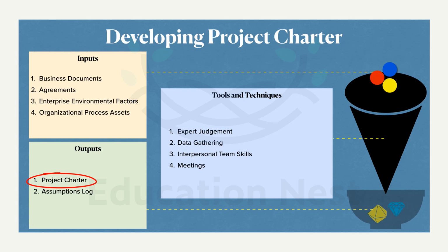Charter. So remember one thing, this needs to be developed by the project manager, of course, but it cannot be authorized by the project manager. So there is a difference here. It will be authorized by the project manager's boss. So it's usually the higher management, the project sponsor who sponsors the project. He's the one who authorizes it. But the project manager still has to support in gathering the data.